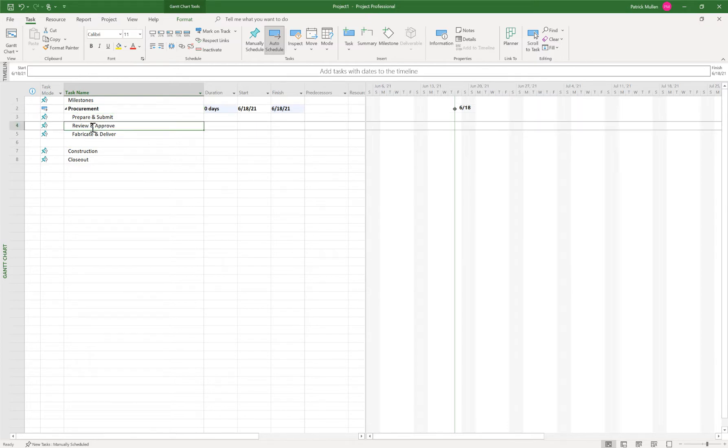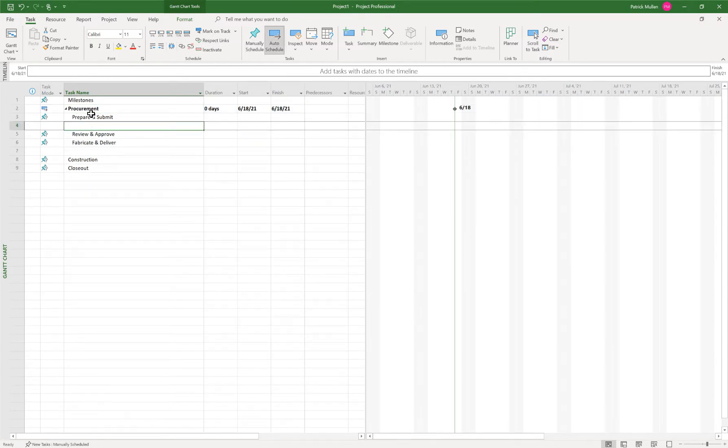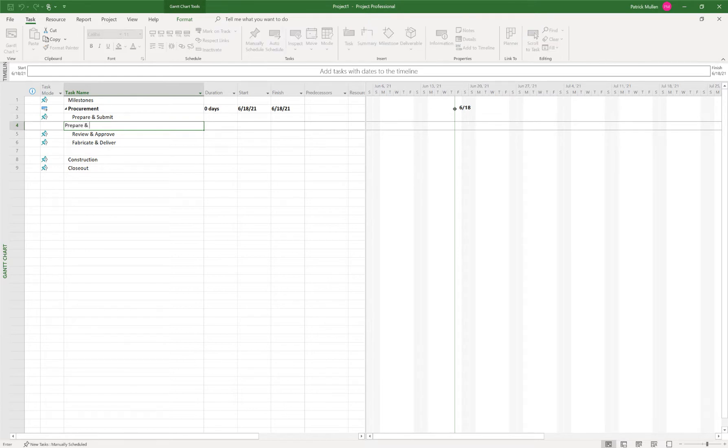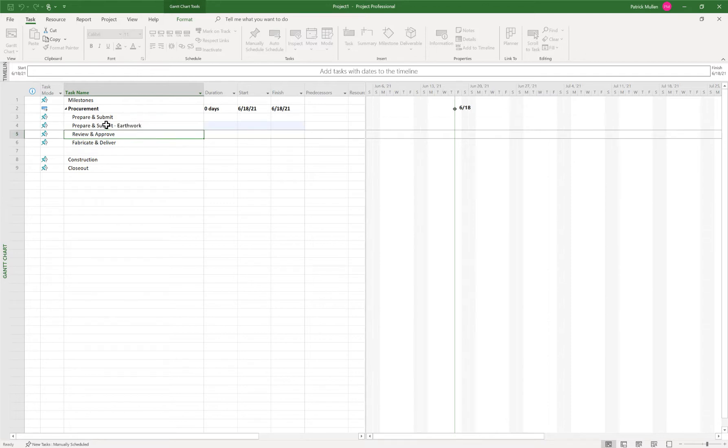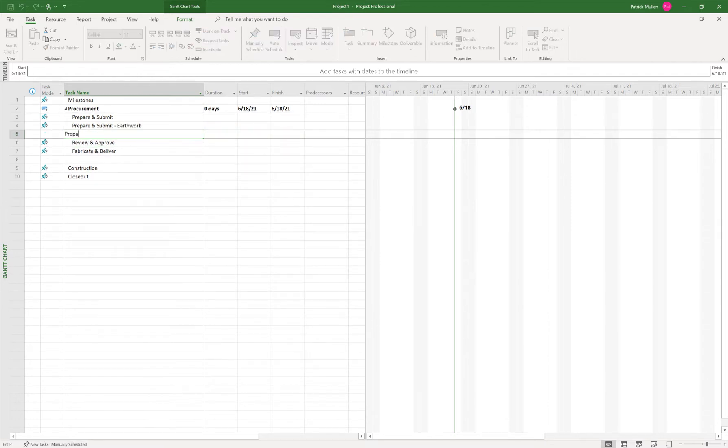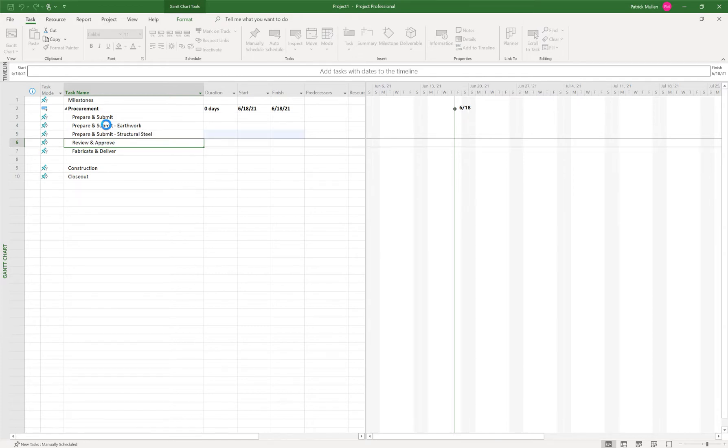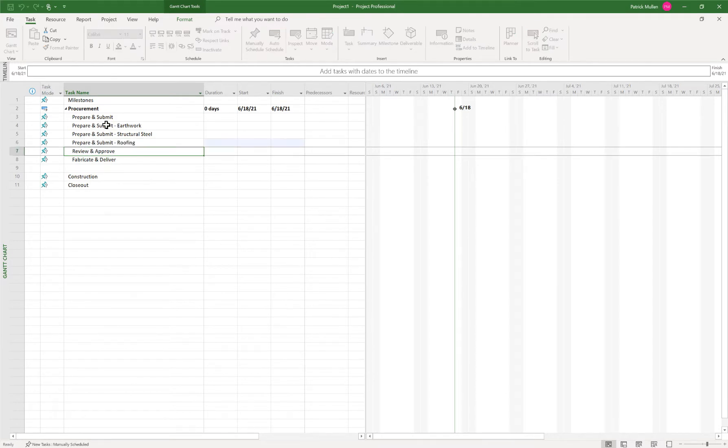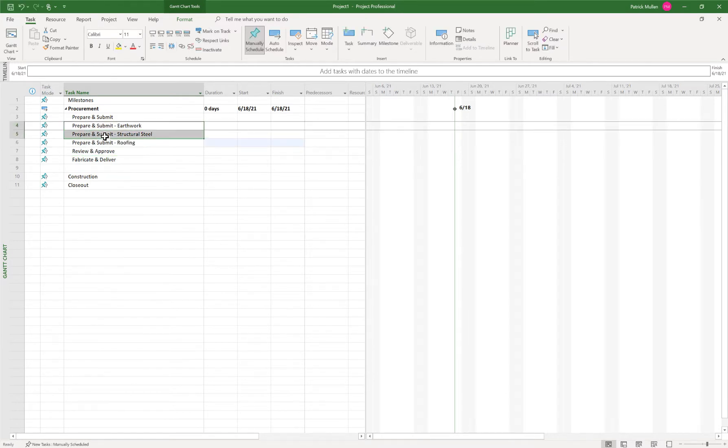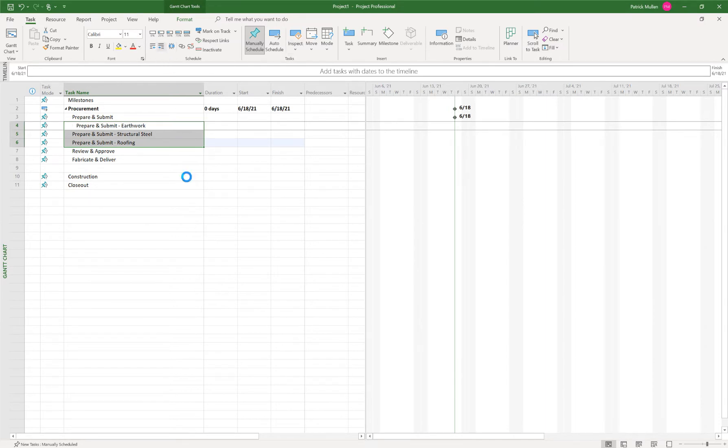And then if I want to create tasks underneath prepare and submit, review and approve, fabricate deliver, I can do that by just saying maybe I'll have an earthwork submittal prepare and submit. Maybe we'll have structural steel. And maybe we'll have prepare and submit roofing. And I want those tasks to be children to prepare and submit. So let's do that.